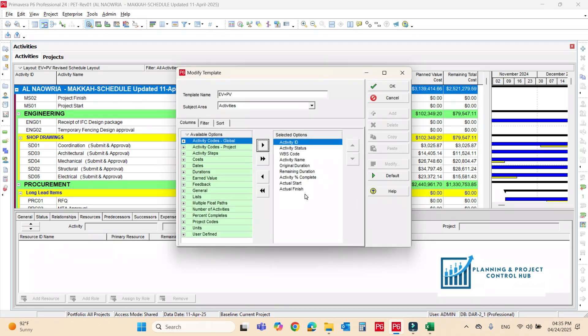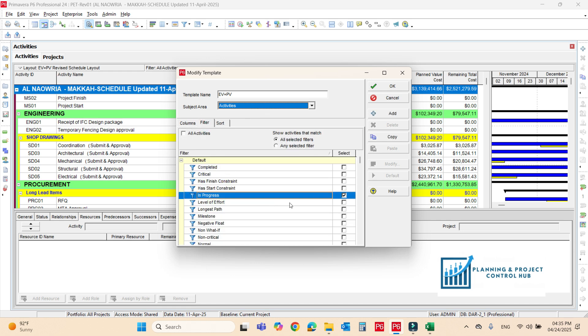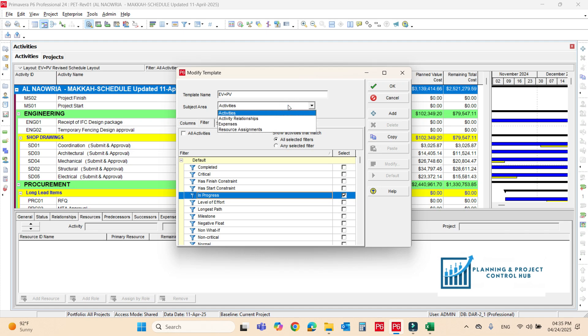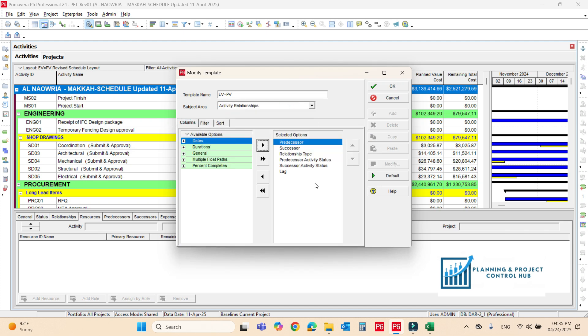If you want to export the excel file, you have to export all this one as well. For the activities, you have to export the in-progress activities. You must note this thing, it should be the in-progress activities. And also, for the activities relationships, you should export these columns.